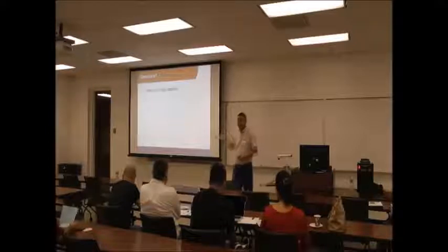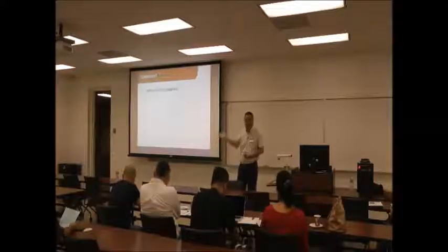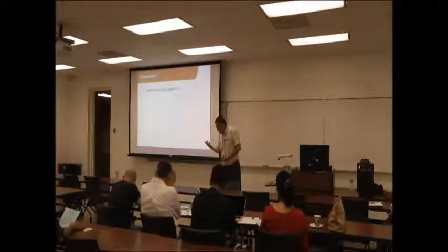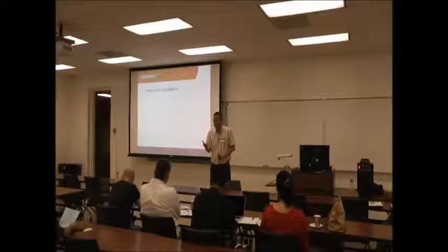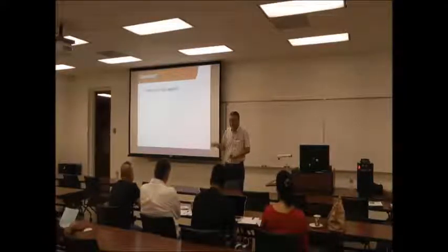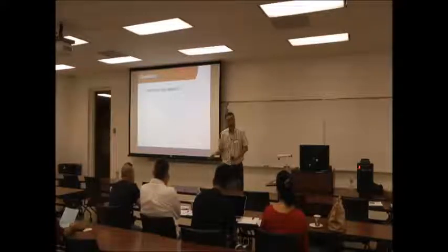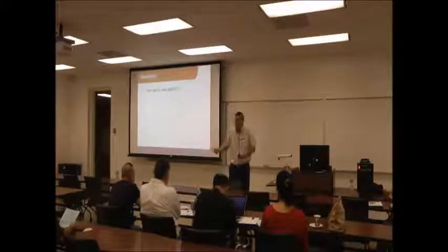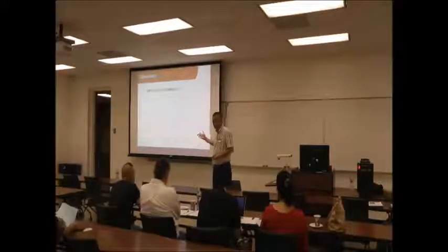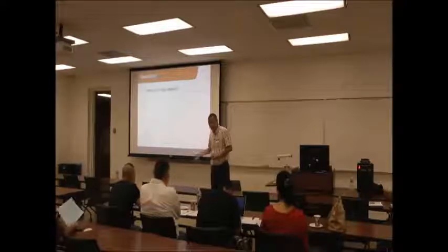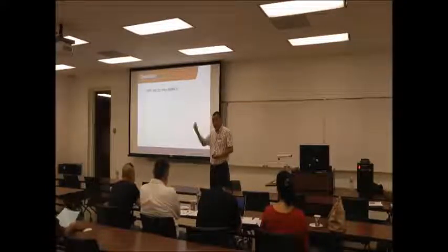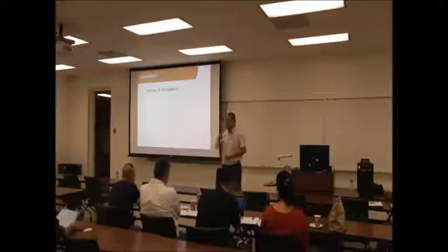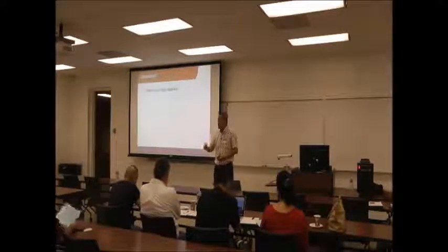If it's later, say a defect you identify after three years of use, first, how did it happen? Where? Identifying the location is going to be added work. Who developed this? Oh, they are gone, right? And after I fix this, I made some change. What is the impact to the other parts of the program? A lot of things. The cost will be much higher. Don't drag things out. That's an economically smart decision.